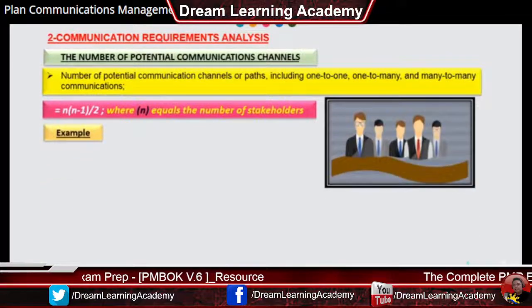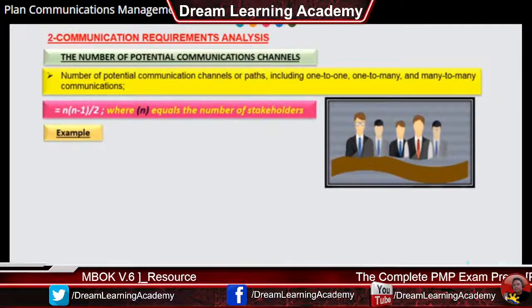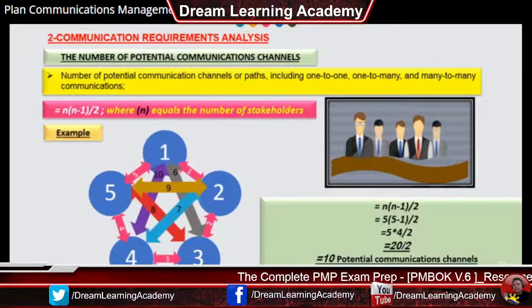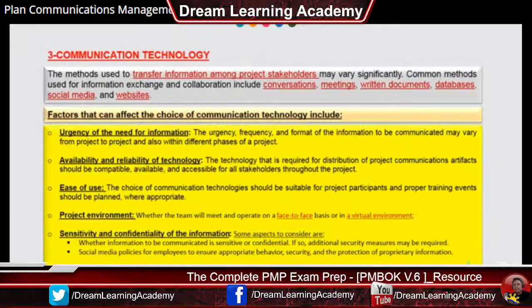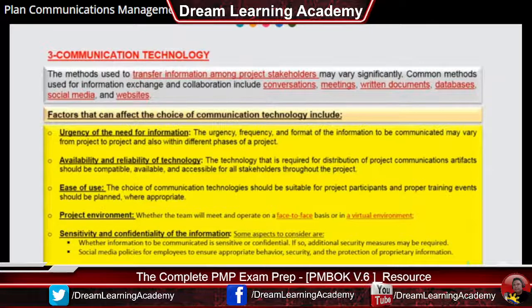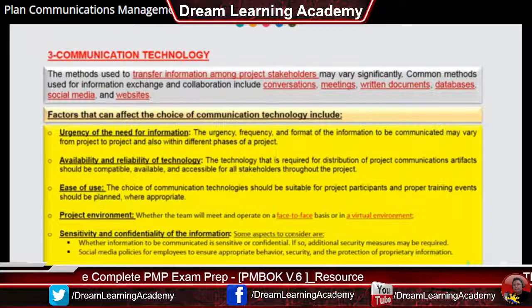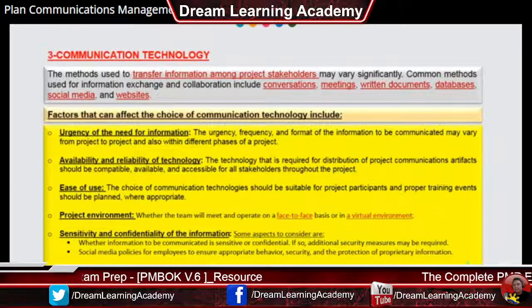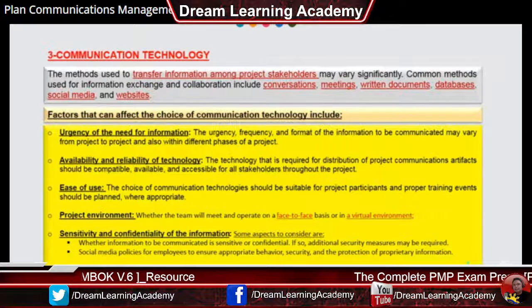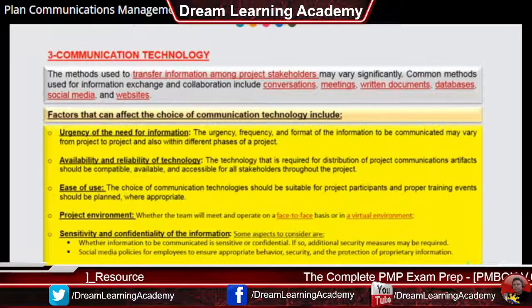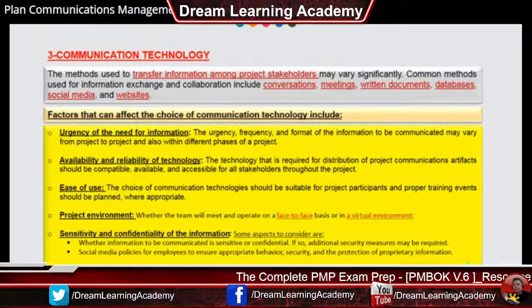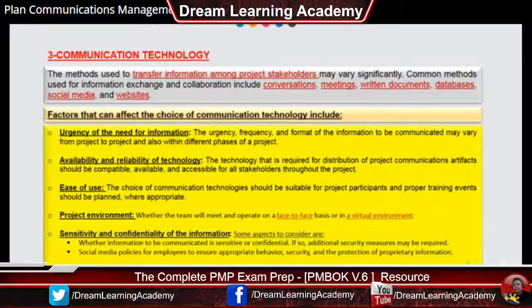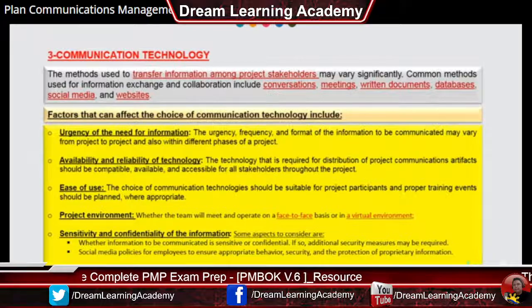For example, if you have 5 stakeholders including yourself as project manager, you would have 10 potential communications channels. Communication technology selection depends on factors including urgency, availability of specific technologies, ease of use, the project environment, whether team members and stakeholders can communicate face-to-face or virtually, and the sensitivity and confidentiality of information. All these factors influence which technologies are chosen for the communications management plan.